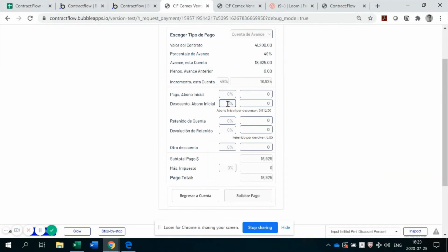The reason we did this in a flexible way is that even though what I've seen companies discount is the same progress amount that they made on a bill, sometimes they do accelerated discounting. So let's say after the first payment they want to discount everything, they can just discount everything after a first payment. If not, this just preloads with whatever progress you've made and it'll discount that.